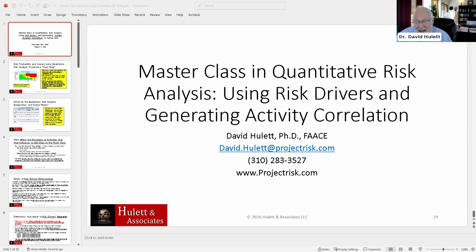I think high impact, low probability risks ought to have a special place in your report, because I don't think it's going to affect many of your results. As I say, unless you're a 95% company, it's not going to affect many of your results. But at the same time, you're ending with something that could very well be important, and your report ought to say that. Okay, but I don't think there's a cutoff point.